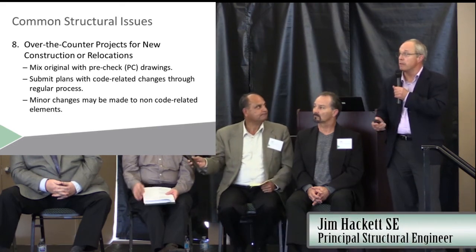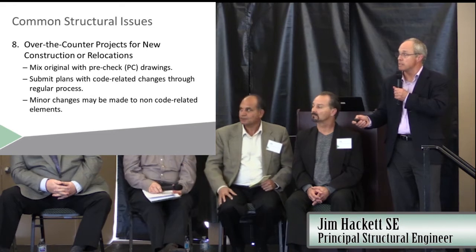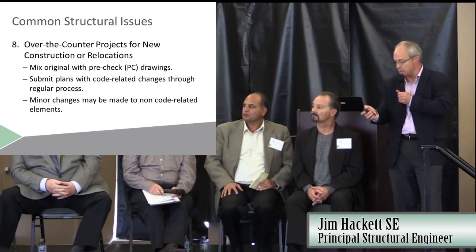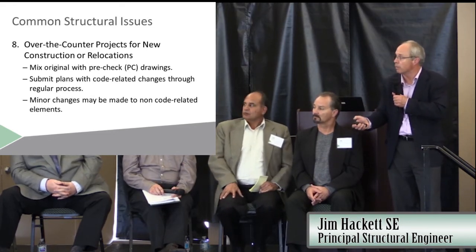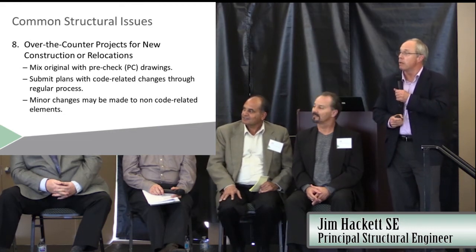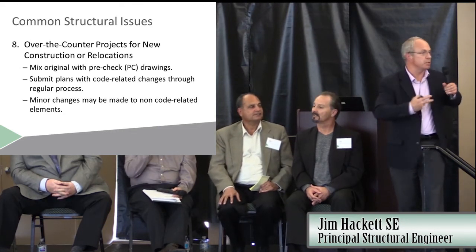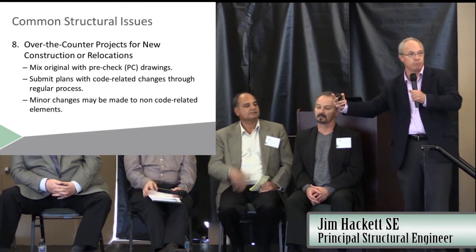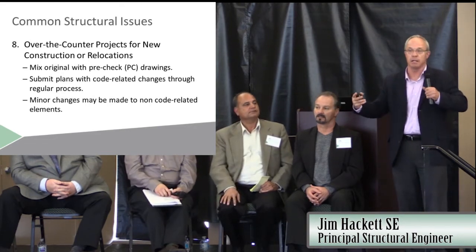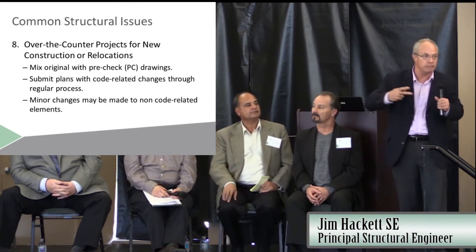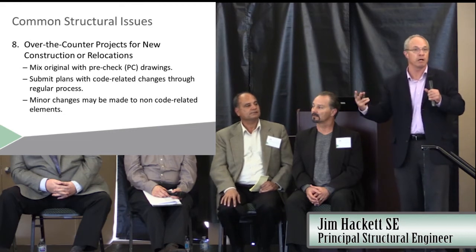Yeah, and one of the things that we commonly see, we get this question all the time, is mixing foundation designs with another PC's building design. Generally speaking, we don't do that on an over-the-counter basis.